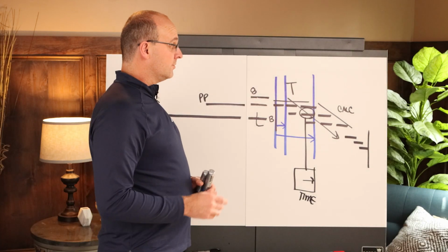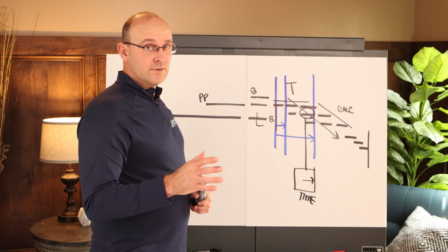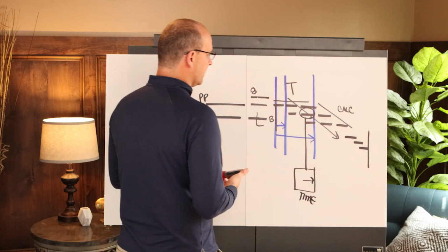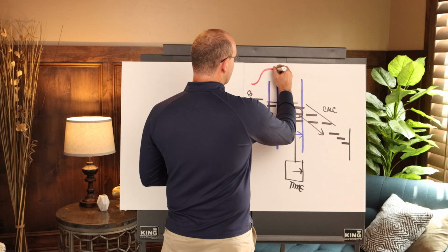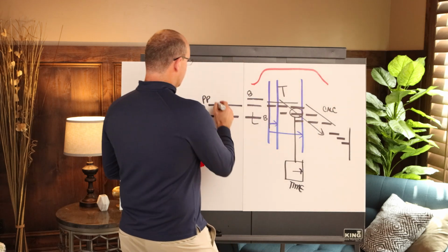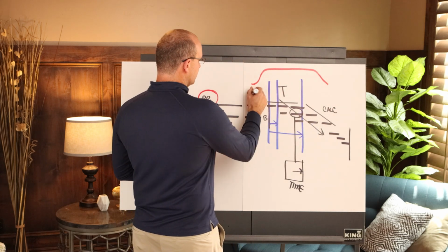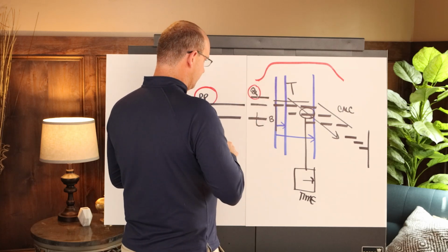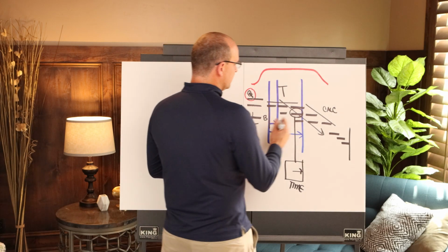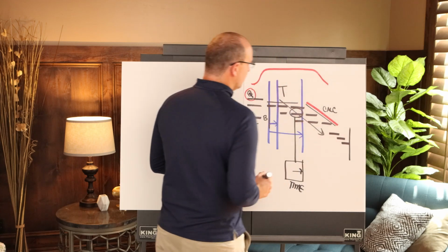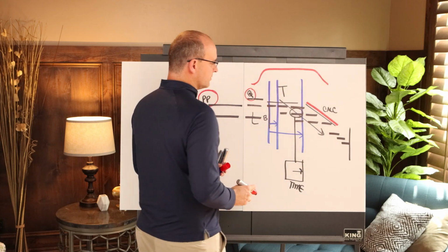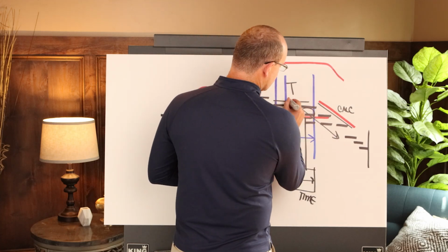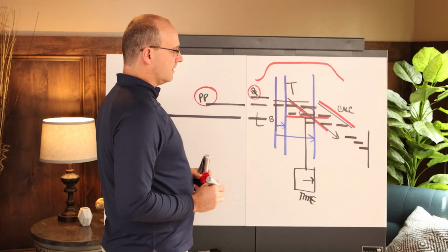If you do this, you'll counteract all of those problems that I showed you before because, and I'll just draw this in red, you have a leveled amount of work in process. You are preparing and planning as you go. This, by the way, should have said Q for quality, okay? And you are finishing on a rhythm. You are reducing variation, which shortens your overall project. You are identifying whether it's zone or trade bottlenecks and able to fix them right away.